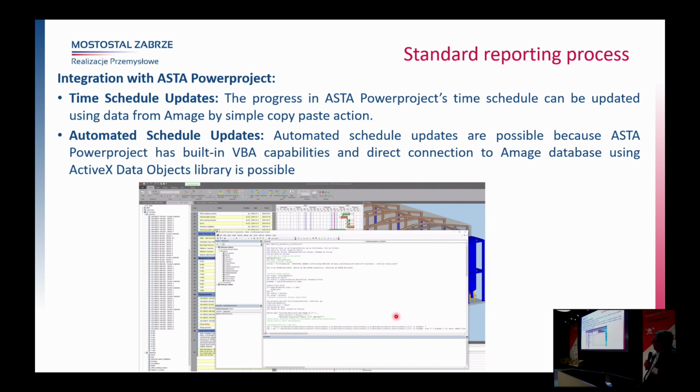Here we can first use some simple copy-paste techniques to update the time schedule, or even, because Astapel project has got VBA built in, we can connect the database directly and update the status of each task just based on the data from the database.